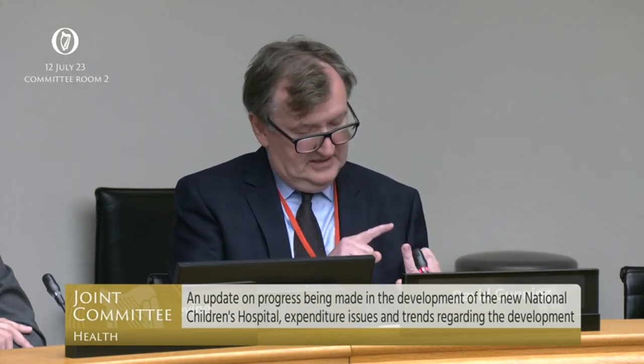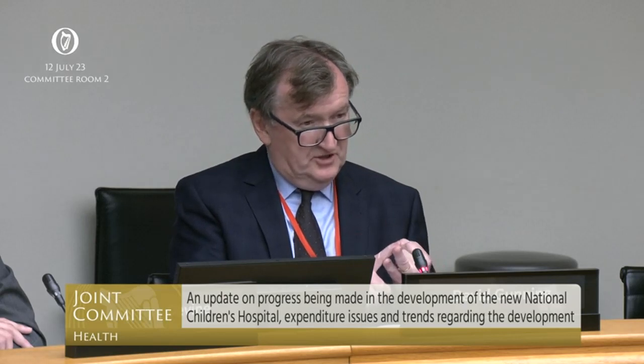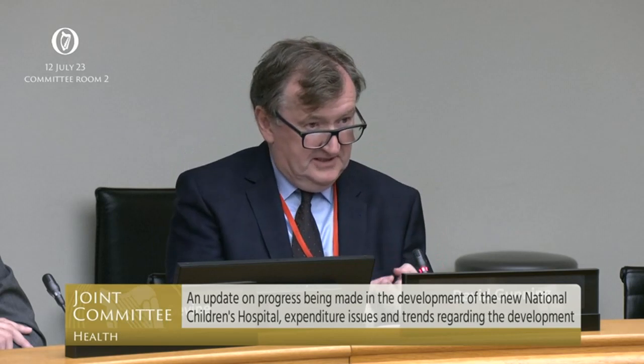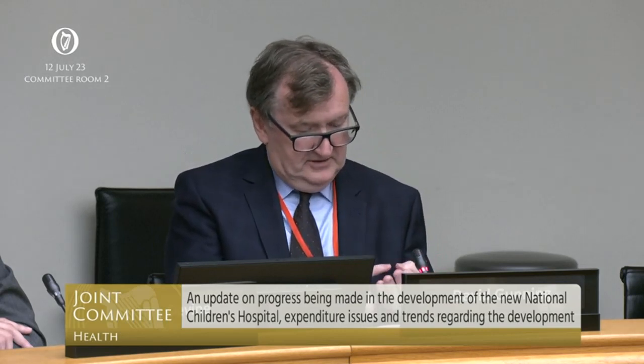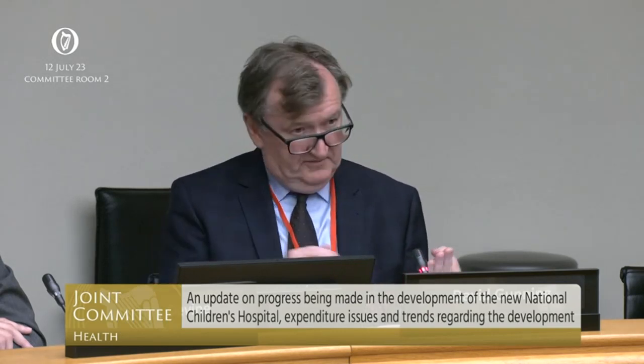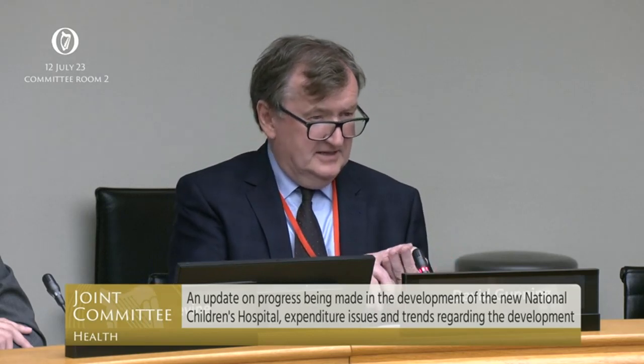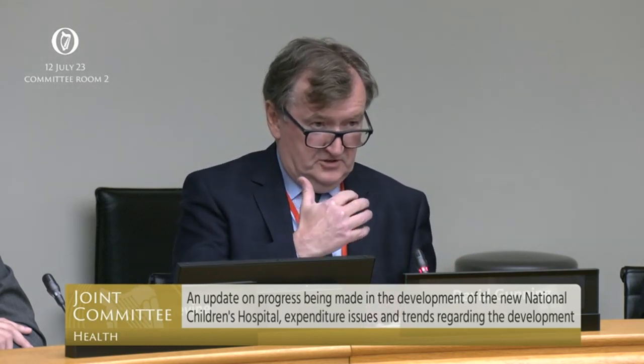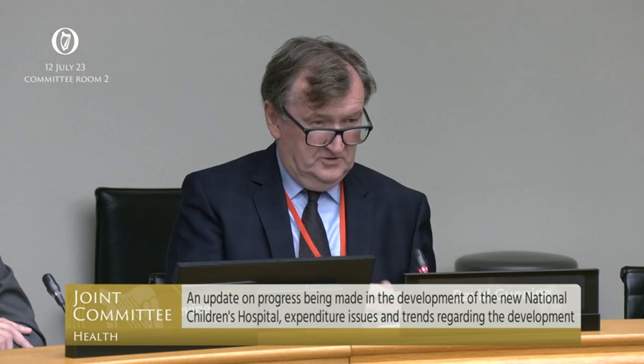There are three sets of liquidated damages under the contract. There's the works itself of the NCH. There's the family accommodation unit works, which is the preparatory works on which another contractor builds the buildings or the foundations. And the third one is to do with the hub rooms that Phelim referred to earlier. The ICT hub rooms is a separate sectional completion. So we have indicated our intention to enforce the contract and the LADs on those three areas.